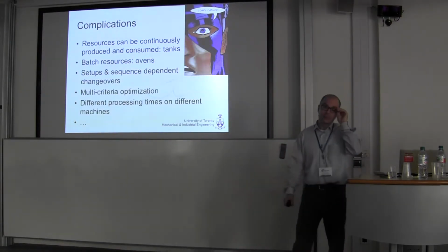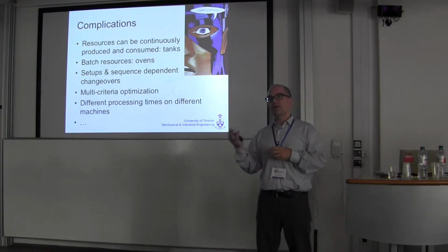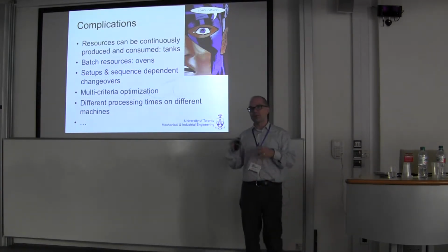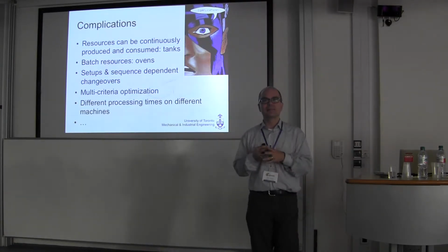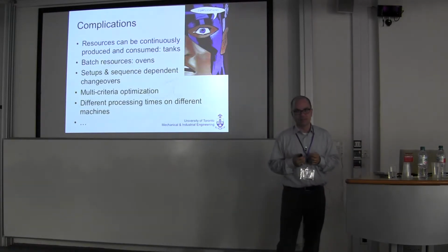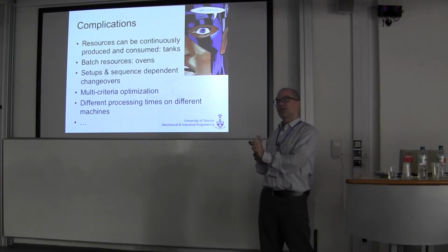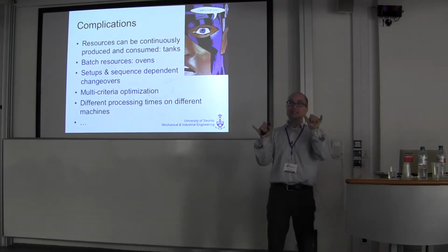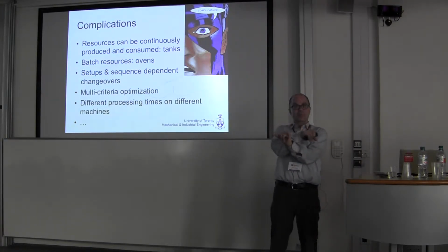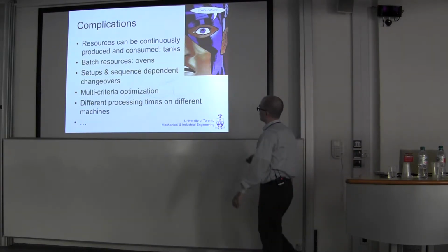Sequence-dependent changeovers. So if you're scheduling a factory that makes food, it makes dog food and it makes people food, okay, well, when you transition from dog food to people food, you probably want to be fairly careful about cleaning out the machines, right? When you transition from people food to dog food, probably doesn't matter that much, right? And so the transition, that is the time from the end of one activity to the start of another activity, can depend on the identities of those two activities. And the reverse might have a different transition time between them. Okay, so cleaning is a classical example of a sequence-dependent changeover.